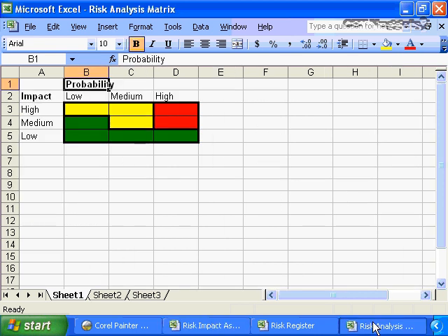So here is a very high level risk analysis matrix grid evaluation form that I've put together that, again, I often use for lower level, less critical risks, or for risks that we simply do not have the level of detail that we need to fill in the previous matrix. So here we simply do an assessment of probability on a low, medium, high ranking and the impact on a low, medium, high ranking, and determine which one of these 9 matrix points that the risk falls into.